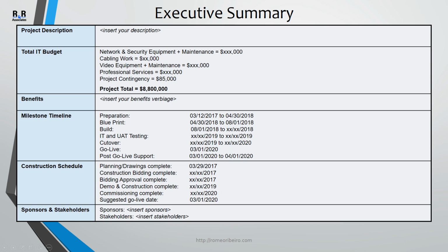And then, depending on the size of the project, or the building in this case, you want to ensure that you have post go live support. In this particular case, we gave a full month, in case any users have issues with any IT related items, whatever they are, from printers to network boards to communication in general, wireless coverage, everything. That you give yourself 1 month to cover that.